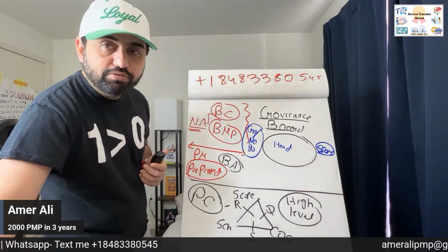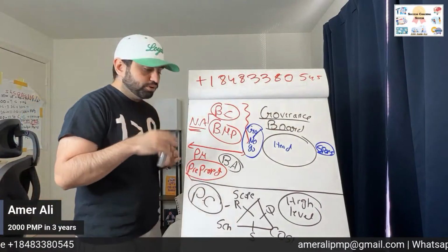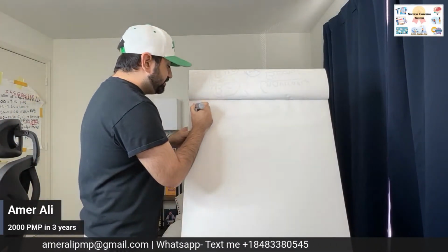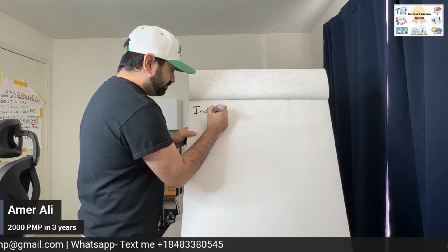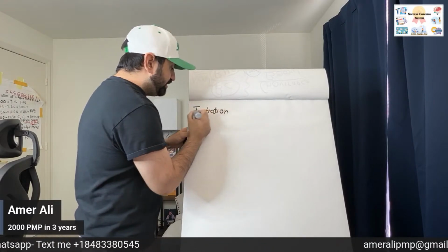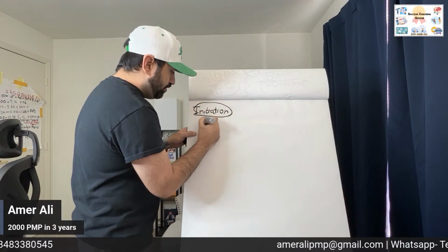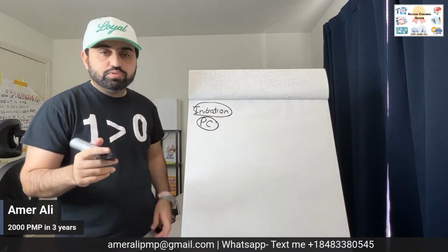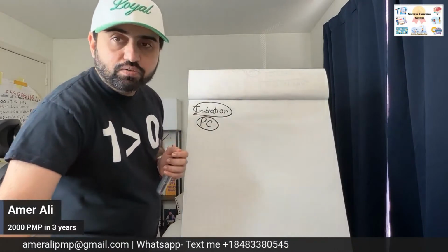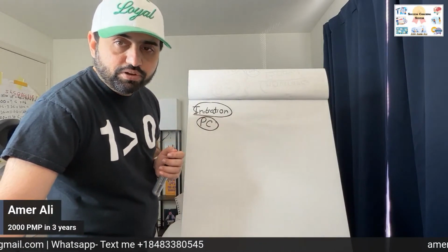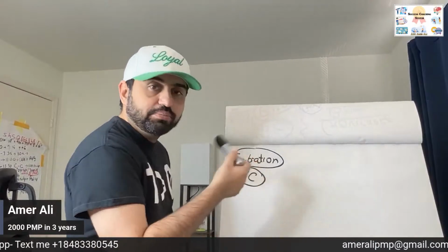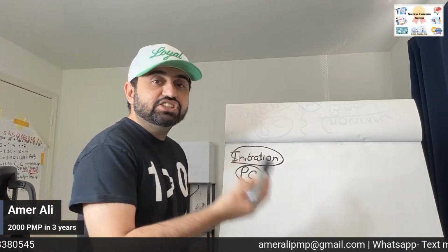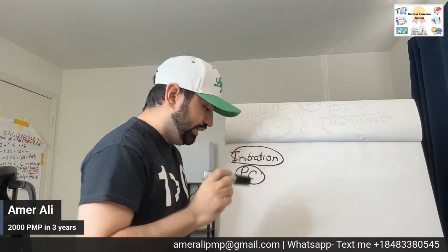So here comes a very important thing. When does the project start? Here comes the initiation part, the first part. When does the project start? When the project charter is approved. Now the project is initiated. Your project has been approved, and we are starting to work with that.